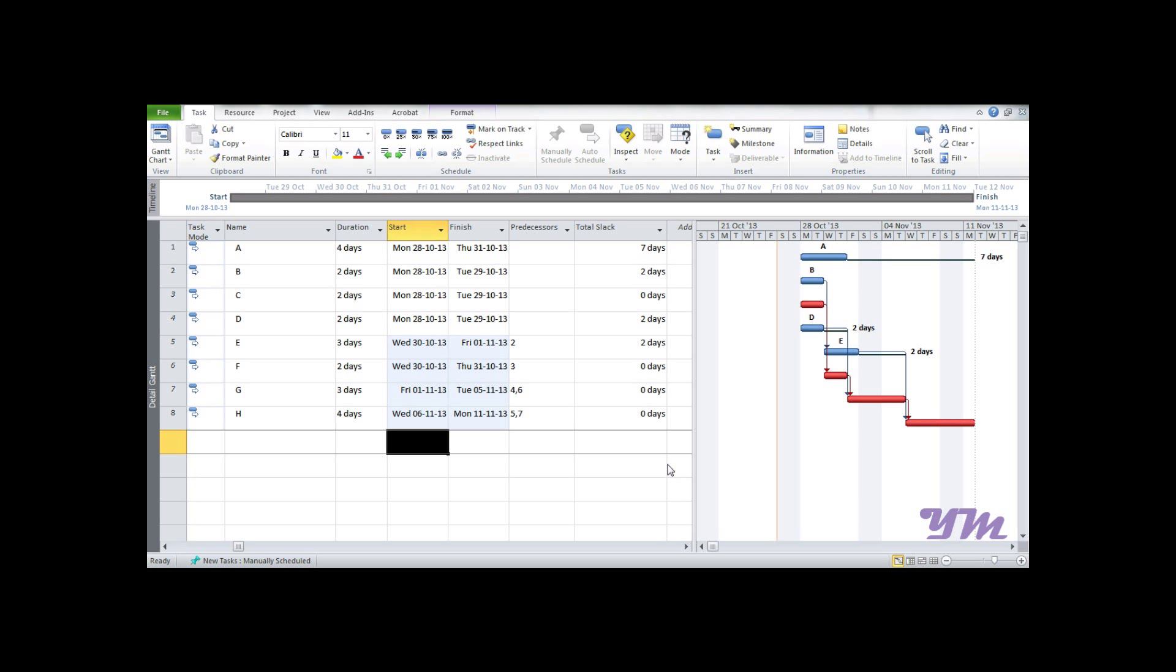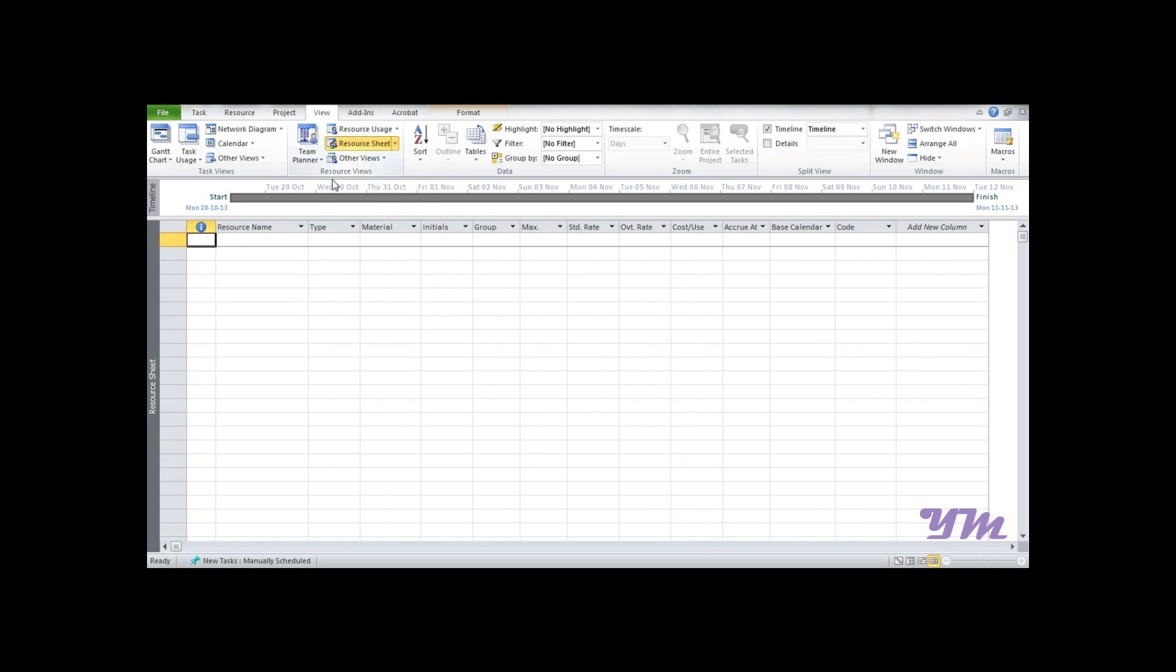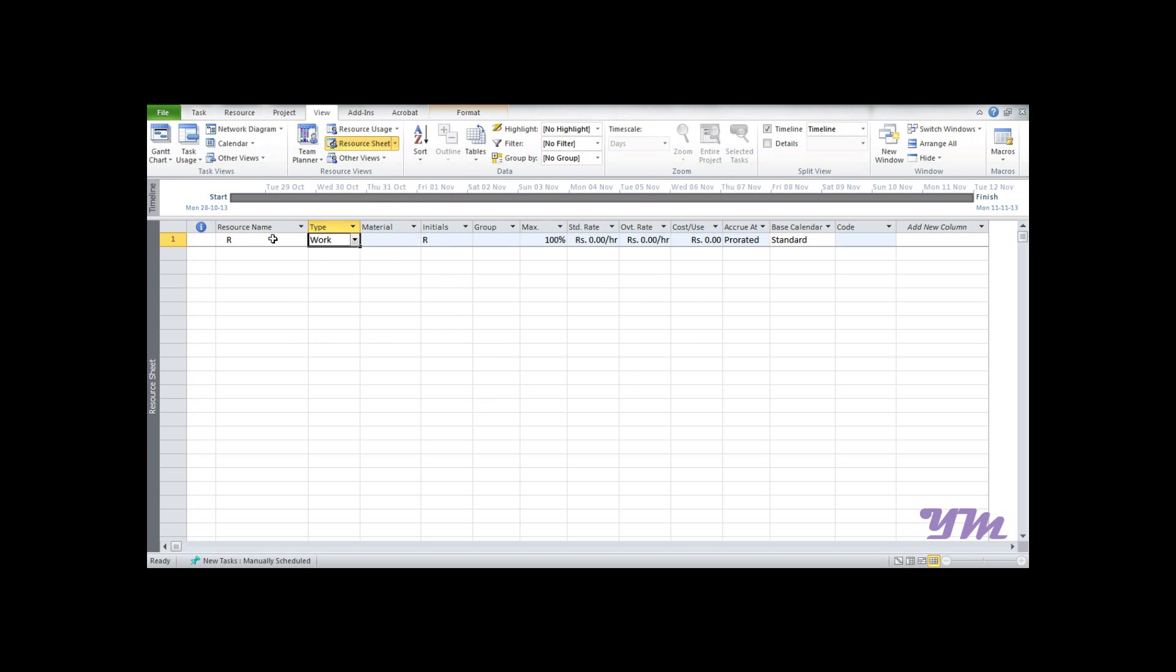Let's begin with the first part - resource assignment. For simplicity, we'll assign one resource named R. To add the resource, first go to View, then click on Resource Sheet. Once you click here, it asks for the resource name - we write R. In Type, we can select whether it's work, material, or cost.